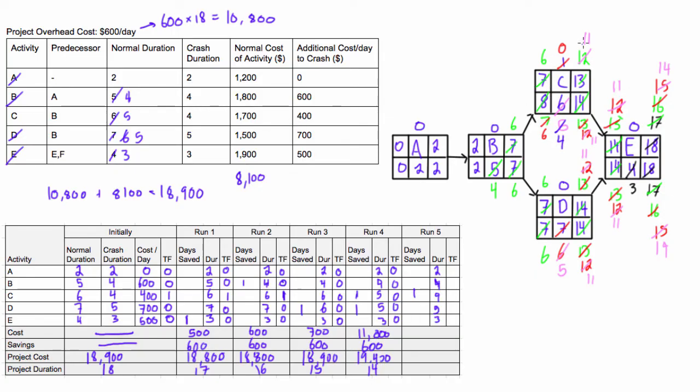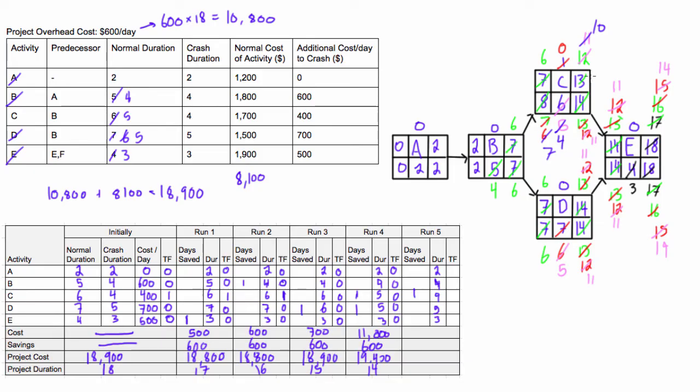So we'll have 6 plus 4. This will be 10. And then we can either bring in a 10 or we could bring in... I'm getting confused now. 11. So that actually won't change at all. None of this changes. And then we'd have 4. 11 minus 4. This late start would actually change to 7 there, I suppose. But you'll see one second, that doesn't actually help us because we didn't actually change this down to 13. So if we go here, total float, this guy would actually go back to 1. Which is not helping us at all. So C total float goes to 1. Everything else would stay 0.